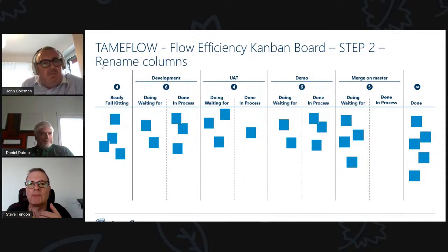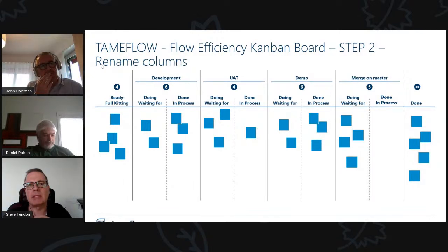What we want to achieve with full kitting is that the business side makes an effort to actually estimate and put a dollar value on the work that they are about to release. So the expectation of providing time forecast estimates on the engineering side is compared and balanced with the value in terms of dollars that business thinks this unit of work will have.